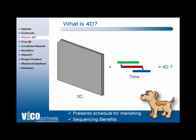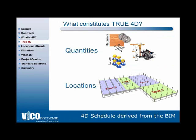So let's have a look at what does actually constitute 4D, true 4D as we are coining in this presentation. When the building information model is linked to the schedule through a database of cost and time, you can actually use it to automate the creation of parts of the schedule for you, saving you time and producing a much more accurate and flexible result.